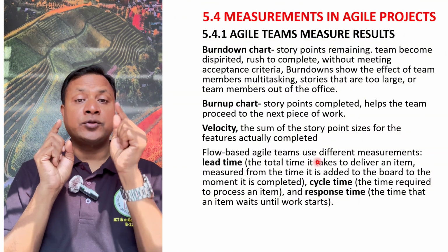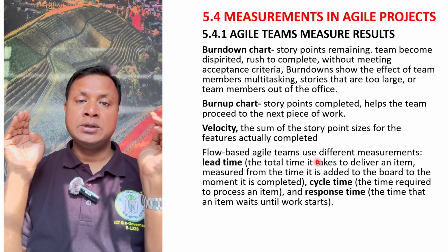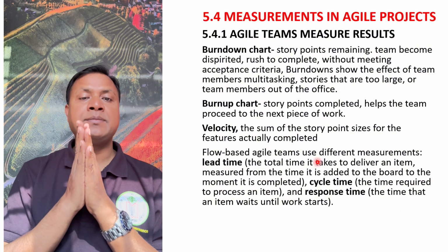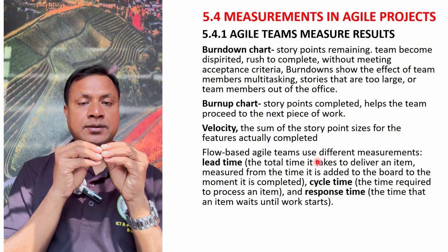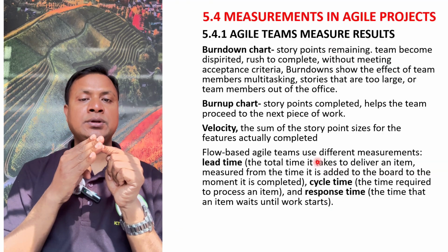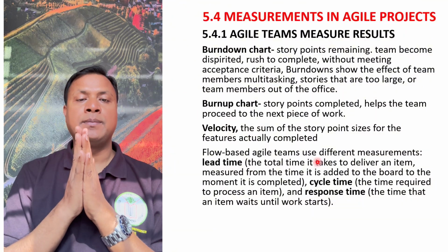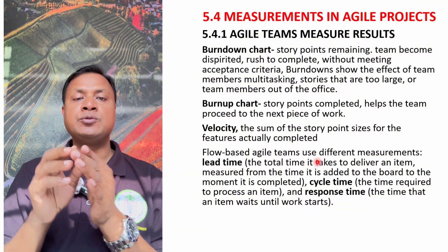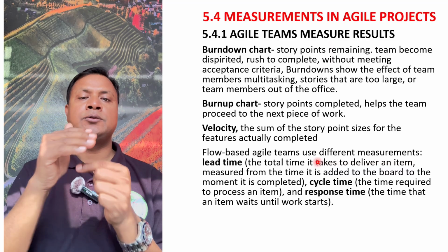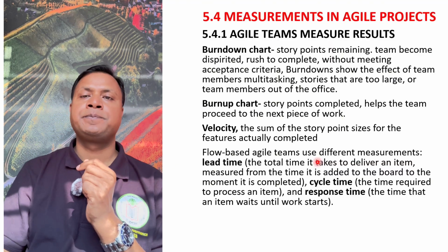Lead time is from the starting point in the queue to the completing time. The whole time is called the lead time. On the other hand, cycle time is when the task is started but still continuing, not completed. So before completing, this time is called the cycle time. For response time, the work is not started, still in the queue, in the line. Before it is started, it's called the response time.